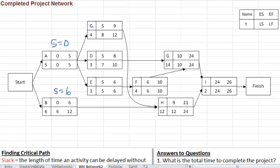Now what about C? Well, the earliest time is five, latest time is eight. So the difference is three. And here the difference is seven minus five is two. And five minus five, here there is no difference. And if we have zero is the slack. Here the slack is zero. Three here, the difference. And here the slack is zero. So those are the slacks of the activities.